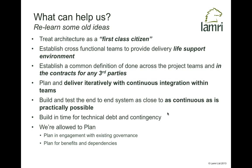We need to build and test the system as close to continuously as practically possible — actually build and test as close to the end of the sprint as possible. We'll also inevitably build up technical debt — stuff that needs to be fixed over the life of the project — so especially in large projects it's worth planning some time for technical debt management, because we know it's going to happen.